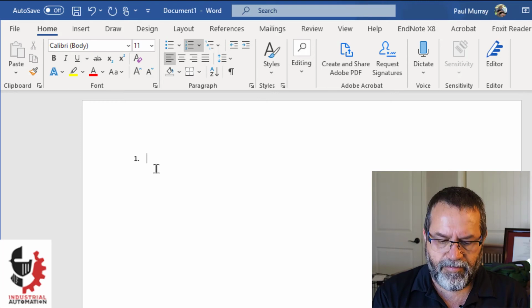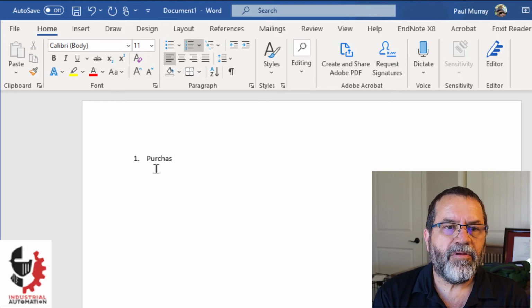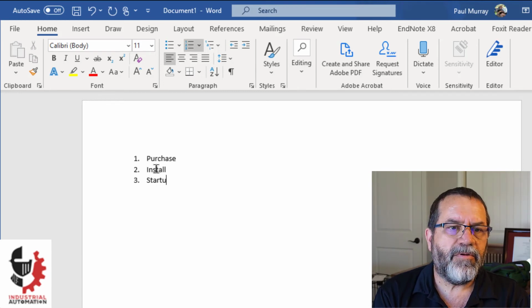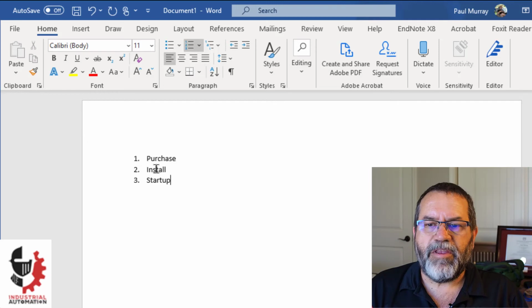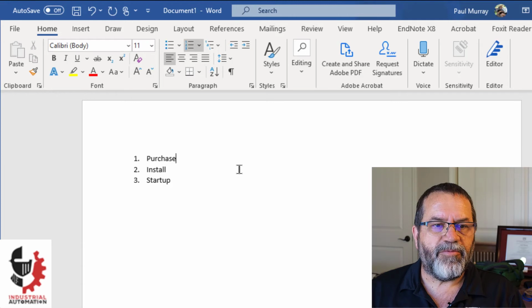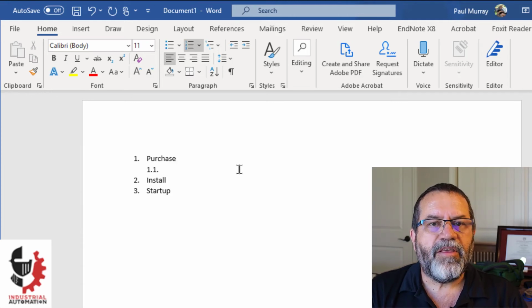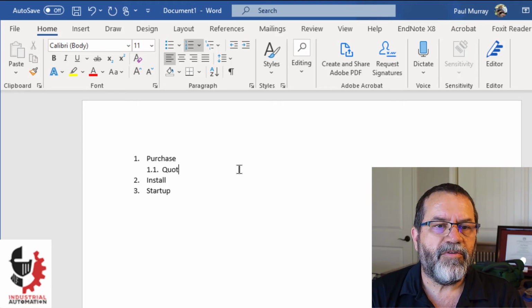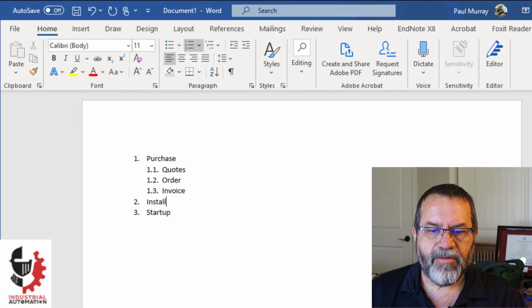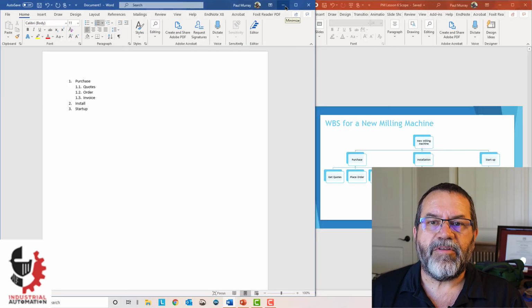So I'll start with purchase, install, and startup. Okay, those are my 3 main levels. Now to put in my next level, and the nice thing about Microsoft Word is it's automated, I'll just do enter here and then tab, and that gives me a 1.1. So I've got quotes, order, and invoice. And I'm just going to fill these all in.